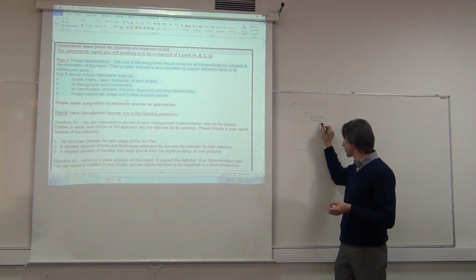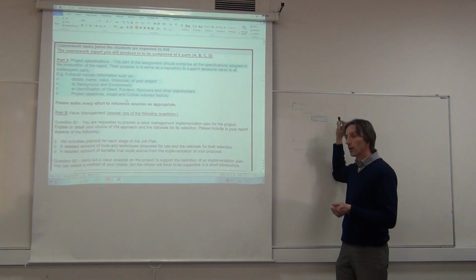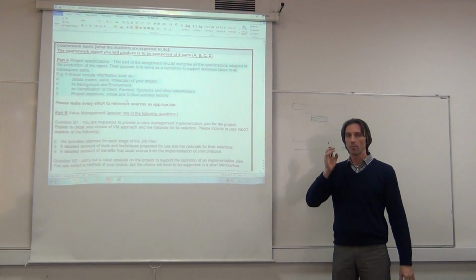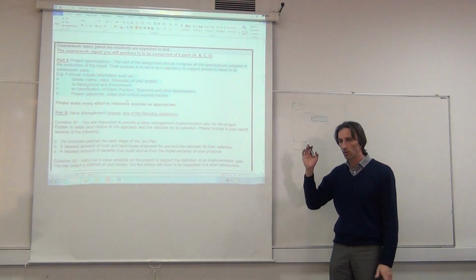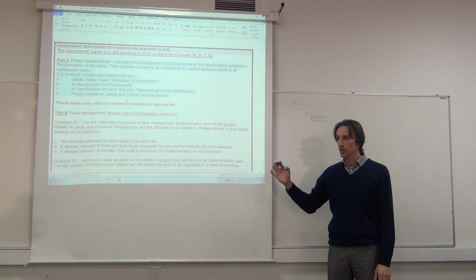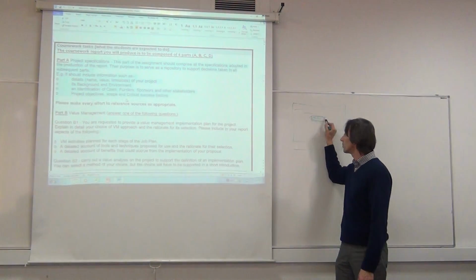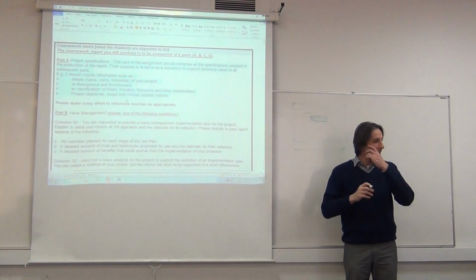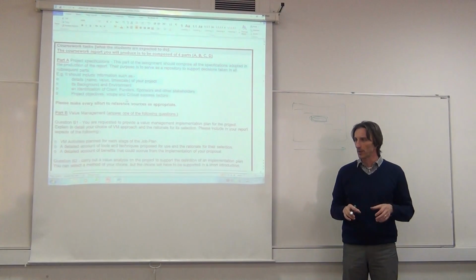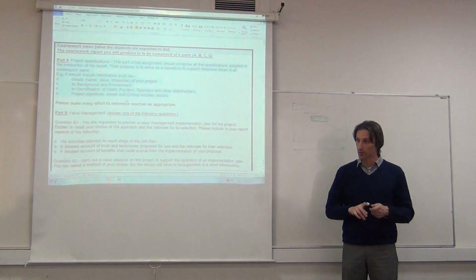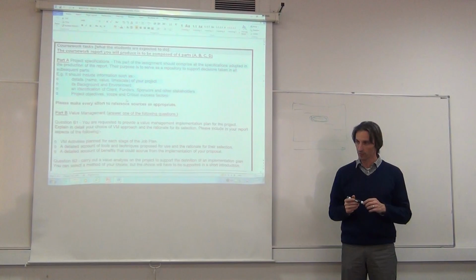But for that specific bit of your project, you could say this is all a project that is very closely governed with milestones every 6 weeks or 6 months, and you have budget reallocation every such and such. With this creative bit, well, that's going to be out of that scheme. For that, we are going to have a completely different way of managing people and money and so on. Because we know that if we do that, we're going to get more juice, more value out of that.